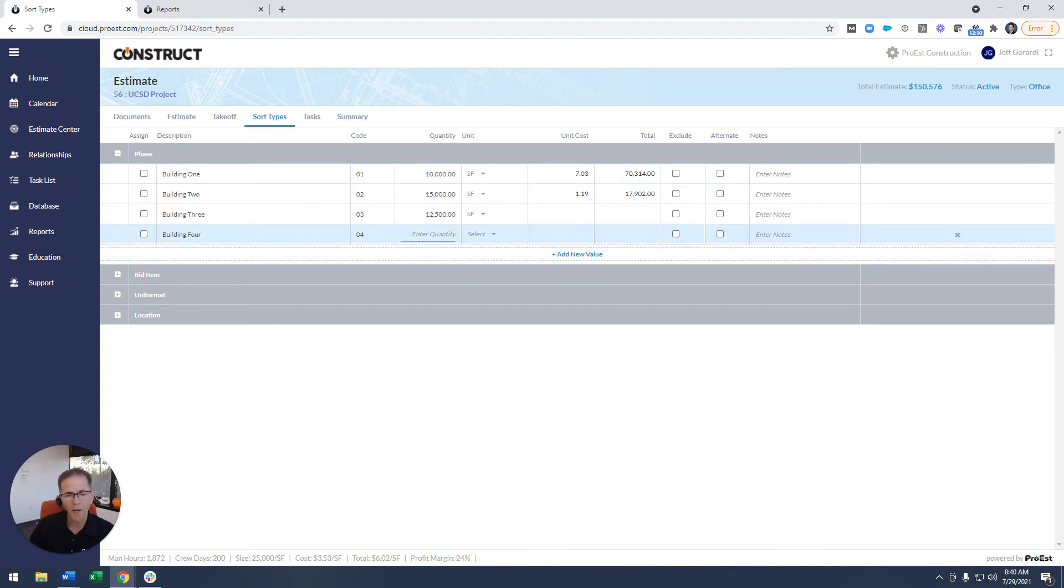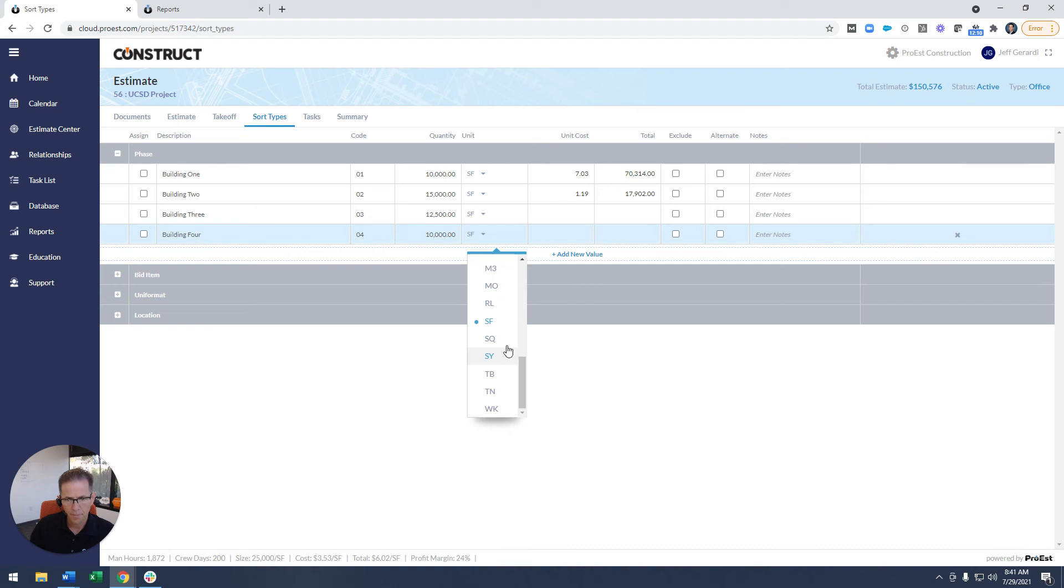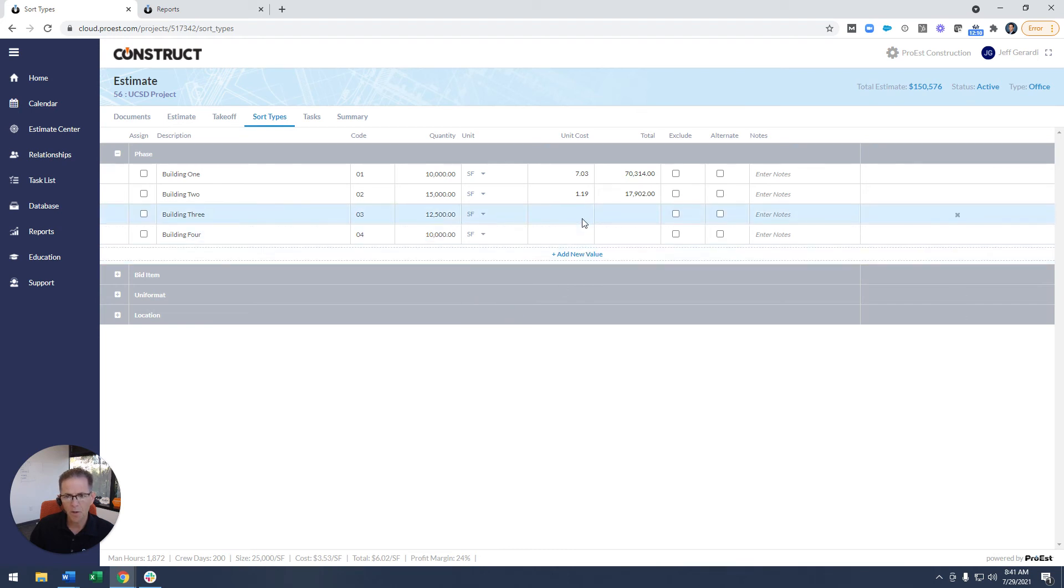I could put a quantity in as well if I want to come up with a quick unit cost. So if I want a different quantity for each sort type of a project, you could do that as well. So maybe this building, a 10,000 square foot building. So it'll give me quick unit cost there as well.